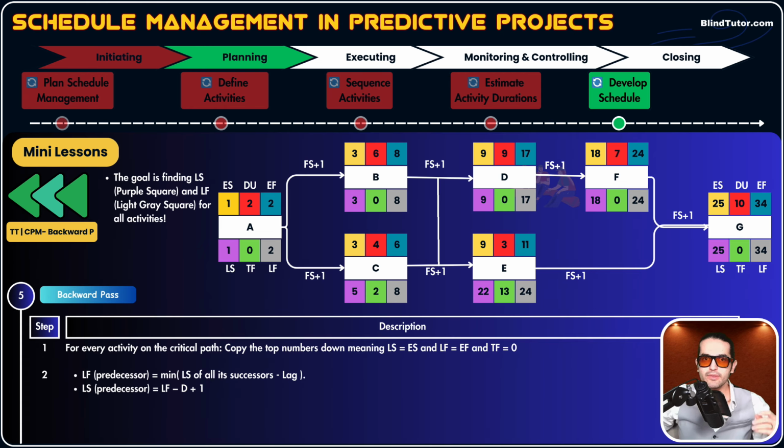Okay, guys? These numbers are important because our software signals you if something is not as planned. If you delay starting work on an activity that is on the critical path, our scheduling software would be like beep, beep, beep, beep. Hey, the project will be delayed if you delay working on activity D. You should start working on activity D on day 9. It's day 10. You haven't started working. So our project will be delayed. Instead of 34 days, if you start on day 10, we're going to have 35 days. So these numbers are for this purpose, to play around.